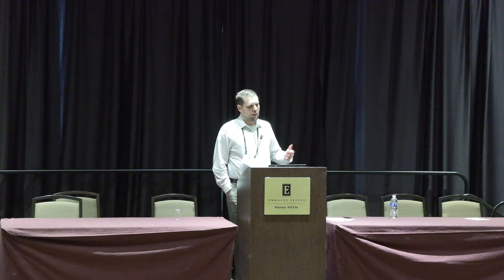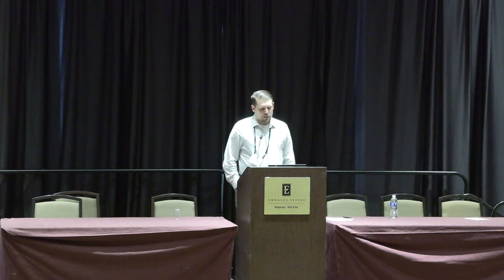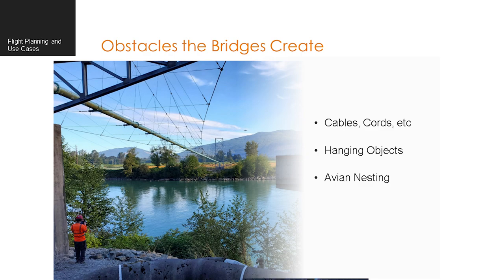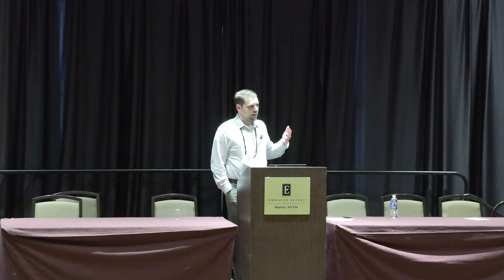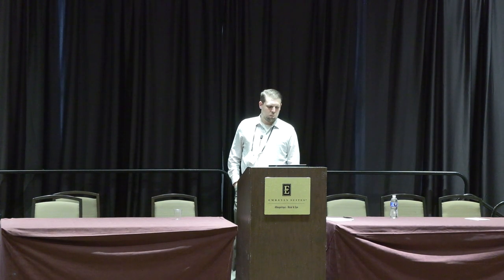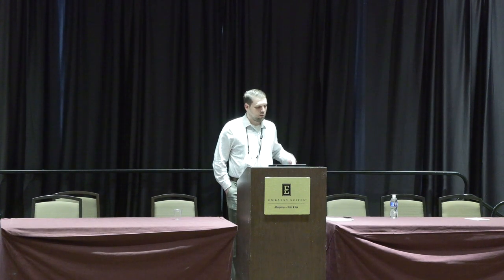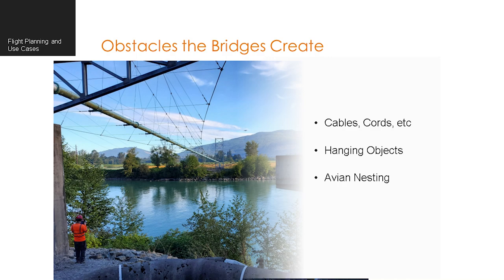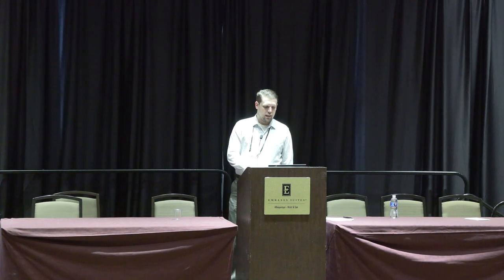We need to understand where those airports are and how we communicate with them when flying. Once airspace is established, we look at the bridge itself. This example is from Washington, just north of Seattle — a pipeline bridge with a lot of suspension cables. It's very easy to get entangled, so we need to understand where our limitations are, where we can put the drone without entanglement, where we can see structural details, and if there are hanging objects like chains. Bird nesting can also be a problem, especially in large numbers.